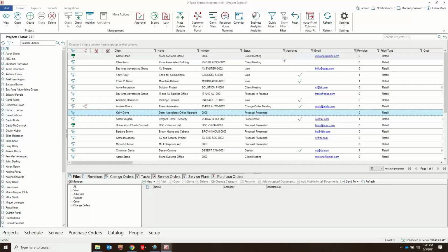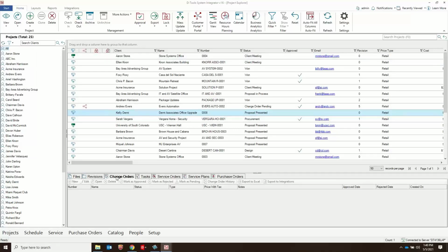Okay, a big complaint that we've had, one of the few complaints that we had about our new change order process we did a few years ago. Everyone seems to love this new process, but the complaint being is there's only one numbering system, meaning whether it's internal or external, we have one numbering system here. So I don't know if everyone is familiar with using that, but when you go to create a change order, we ask you if it's external or internal. External being something your client requested, generally the most common ones, I would think, but then there's also a ton of internal ones that happen, engineering changes inside of a job.